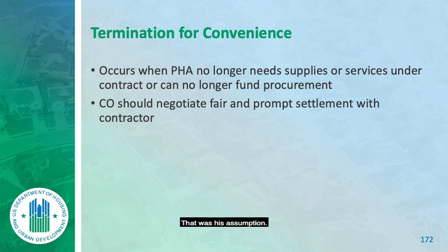That was his assumption. That's about not to exceed amounts, which is in some ways related to contract options. Because if we give them a not to exceed amount, it doesn't mean we owe the money on all of that. We owe the money based on work that has been assigned but not yet completed. That's what we owe the money on. Because remember, for the work completed, they have already received their profit. It's the work that's been assigned. Just having a not to exceed amount does not mean that the work has been assigned.